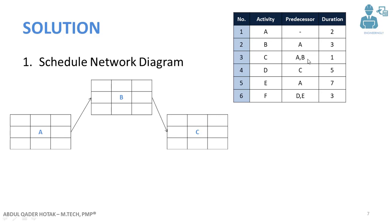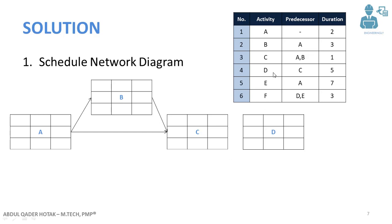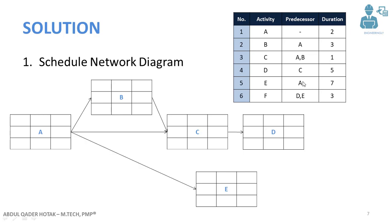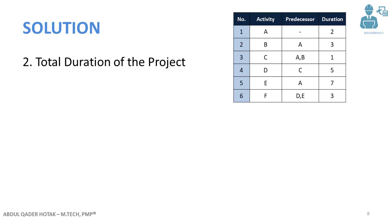Activity D's predecessor is activity C, so we connect it to activity C. Then we have activity F, whose predecessors are activity D and E, so we connect it to both D and E. So here we have the complete network diagram for our project.